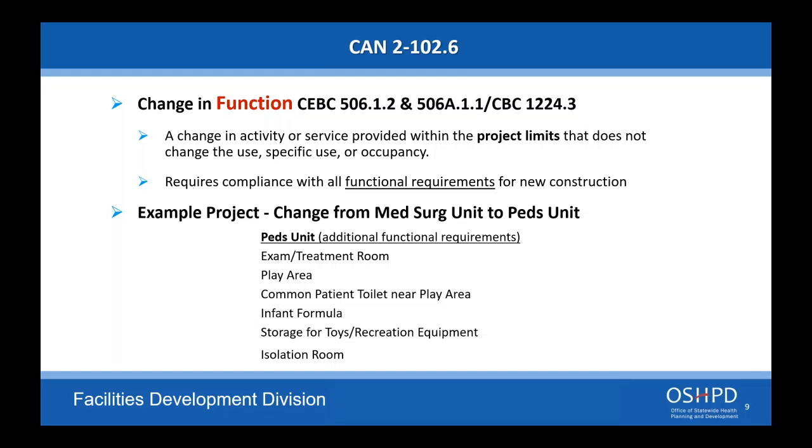And like I said, I've literally turned away projects that were 100% cosmetic upgrades because they thought they had to submit a project. Another example is if you're doing tile work in a toilet room, basically doing cosmetic only. You're removing the tiles, and to do that, you have to remove the hand washing fixture and the toilet. But you're putting everything back in kind. That is still cosmetic. You're just replacing the finishes.